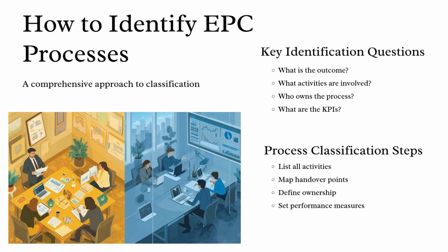Step 3: look at interfaces. Processes exist where the handovers happen, like engineering to procurement, procurement to stores, stores to execution, execution to billing. So anywhere confusion happens, a process exists. Step 4 is identify pain points, that is delays, cost overruns and NCRs. Whenever the projects keep breaking, there is a process waiting to be documented. Hope you understood this, of course at a very high level.